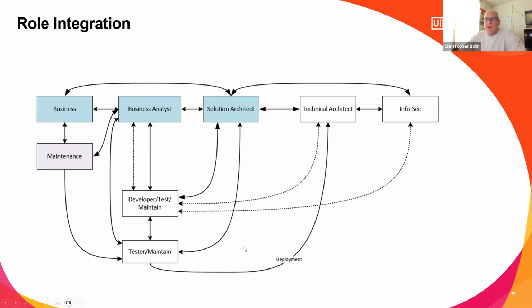The developer may also be involved in what we call hypercare and UAT testing. If you're in UAT testing and you run into something that was not what you expected, and it's part of the PDD, because the developer just plain missed it or misunderstood it, or it's hard to build sometimes from a functional document, the developer will come in during hypercare and testing and maintain that, and maintain any changes. Hypercare, in most instances if you're working with a federal agency, can be anywhere from 30 to 90 days.